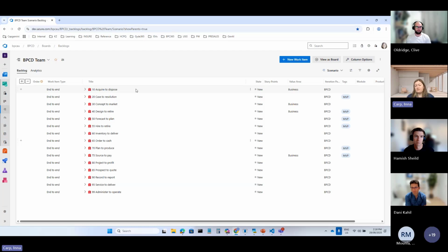The same for acceptance criteria. So what do we need to describe acceptance criteria? How do they need to look? Another context that we can provide is how to create test cases, because in Azure DevOps, we can also create test cases using GitHub Copilot, and it creates new work items and adds them as linked child items to the requirement. So we provide all of these instructions.